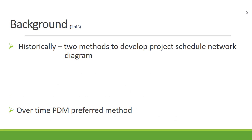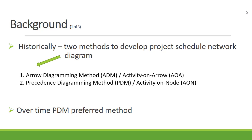Historically, two methods were developed to do the project schedule network diagram: the arrow diagramming method, also known as activity on arrow, and the precedence diagram method, also known as activity on node.